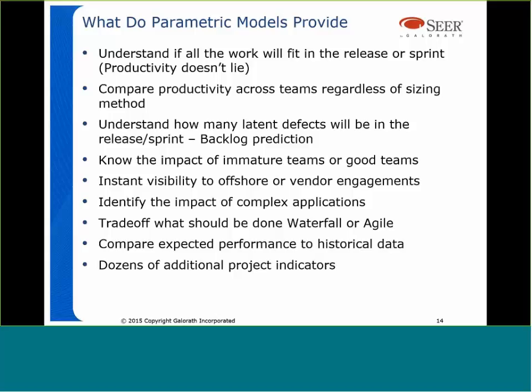So you may have one team that's doing story points, maybe another one doing feature points, another one doing ideal days, etc. When you take all that and put it into the funnel of the SEER model and you generate what we call effective effort units, everyone's equal on the playing field. So now we can understand which teams are being productive, which teams are less productive, and then we can take a look at it and say, is it because the team is less productive, or are they working on something that's more complex, etc.